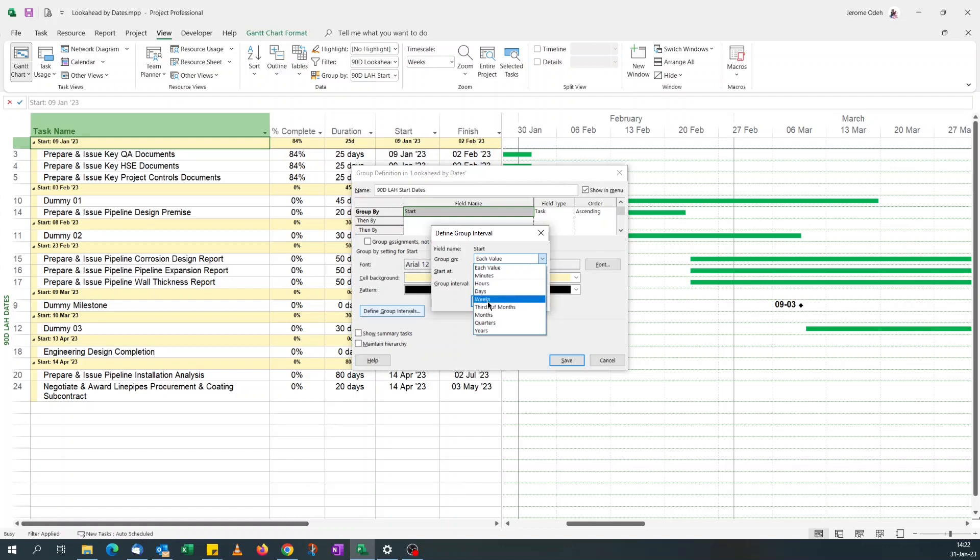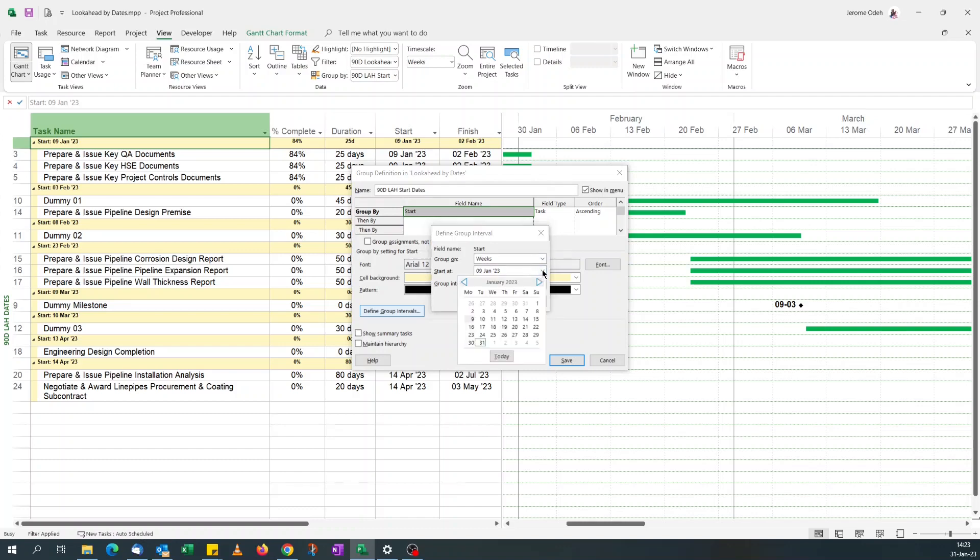You got a one-week look ahead, if you want to group by hours you can do so. But because I've got a long, like a 90-day window, I'll go for weeks and I'll say group interval one-week interval. Show group activities by the week they occur. And I'm starting because my project starts on the 9th of January, the start is 9th of January.